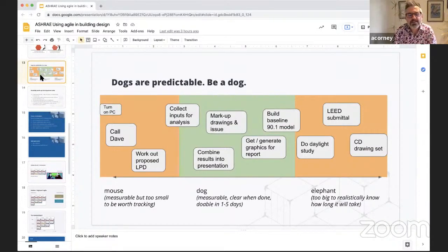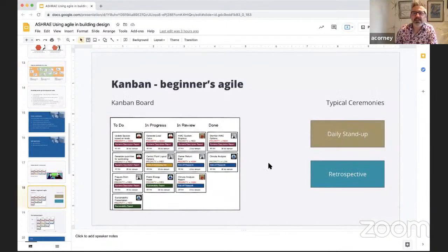In terms of whether you need to have ceremonies to discuss what people are doing or to celebrate success, rather than having a stand-up every day, if there's really nothing that people would need to share with each other, you could limit it to a retrospective, a ceremony at the end of every 1 or 2 weeks where you talk about the work that's been delivered, how your work processes are going, and whether there are opportunities to improve.